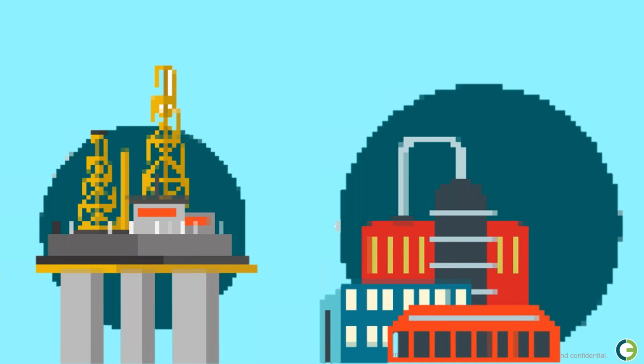So excellent choice. So this $100 million greenfield project will form a receipt, metering, storage, and pump station complex in rural Alberta, Canada. It includes 2 general contractors for field disciplines and 2 additional contractors for off-site fabrication of pipe and steel. With 6 construction work areas, there's an expectation of 50 construction work packages and 400 installation work packages. So it is the smaller of the two, but it's still a good sized job.